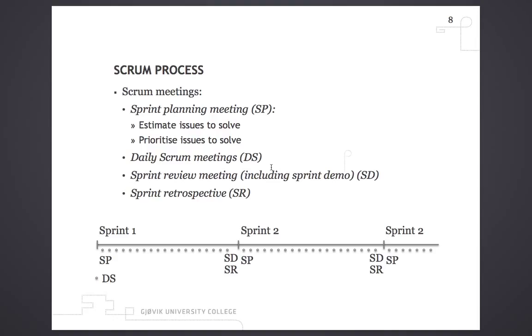We also call them stand-ups, these daily scrum meetings. You have to agree upon when you're going to have your stand-ups. Preferably every day, but I know that when the teams are spread across different locations and you have other courses to attend and so on, it's quite hard to be able to do that. But if you manage it, it's the best. And these meetings should be really short, like 5-10 minutes. So just do it over Skype, for example? Yeah.